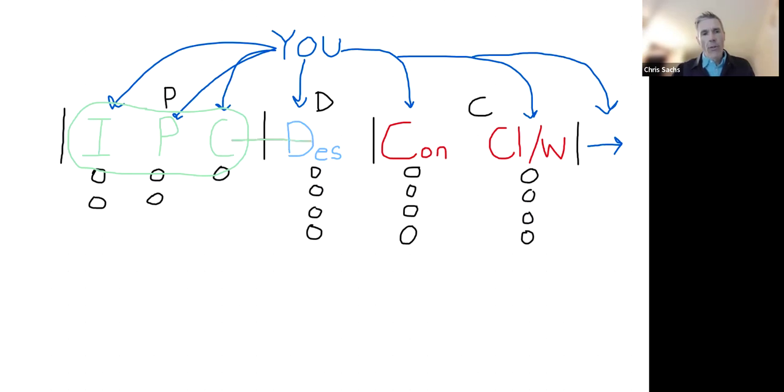Because now, if you have a good understanding of your project within the programming phase, that will save you an incredible amount of time and money. Because as this project moves along on your project timeline, changes that you would like to have happen to your project cost considerably more as you get later into the process.